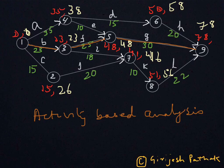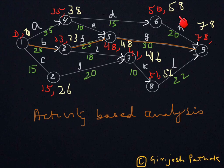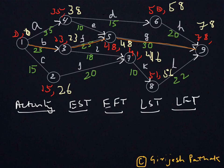Now here we are going to do activity-based analysis, where for different activities we will be finding out the earliest and latest times. Since for an activity there is a start and a finish — unlike events which happen at a single time moment — we will have four measures: Earliest Start Time, Earliest Finish Time, Latest Start Time, and Latest Finish Time. We will calculate all four for different activities. Let us start with activity A.